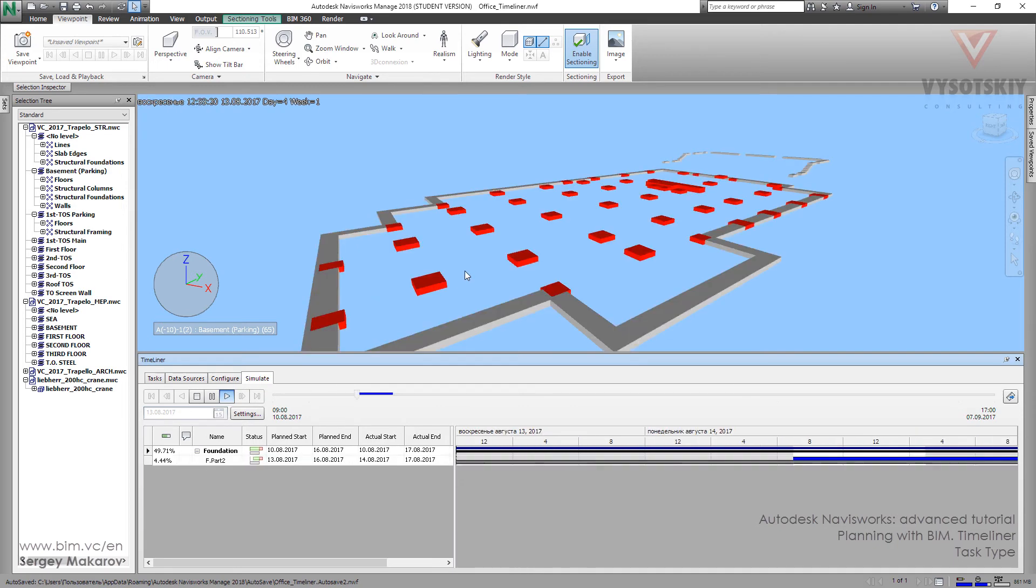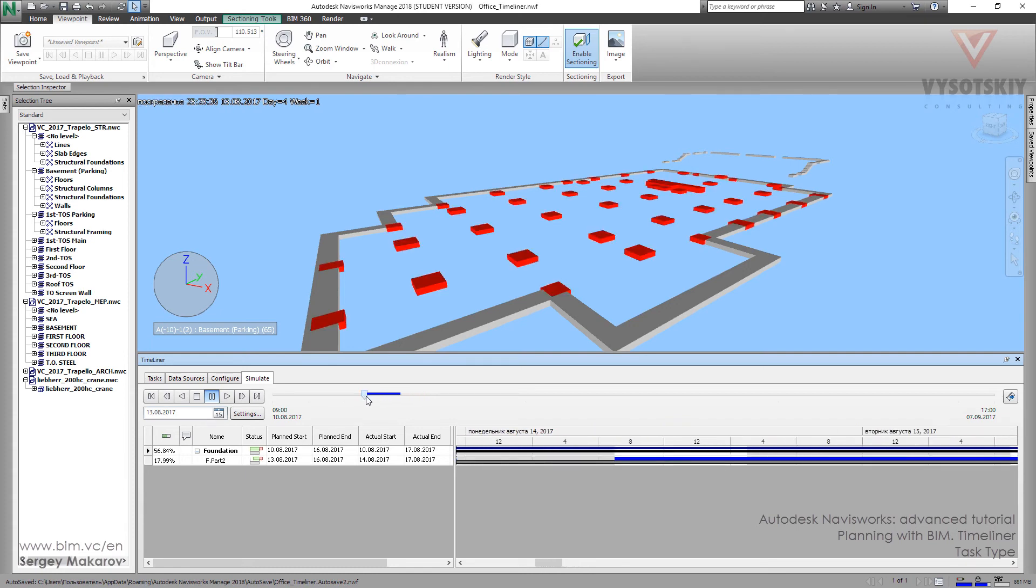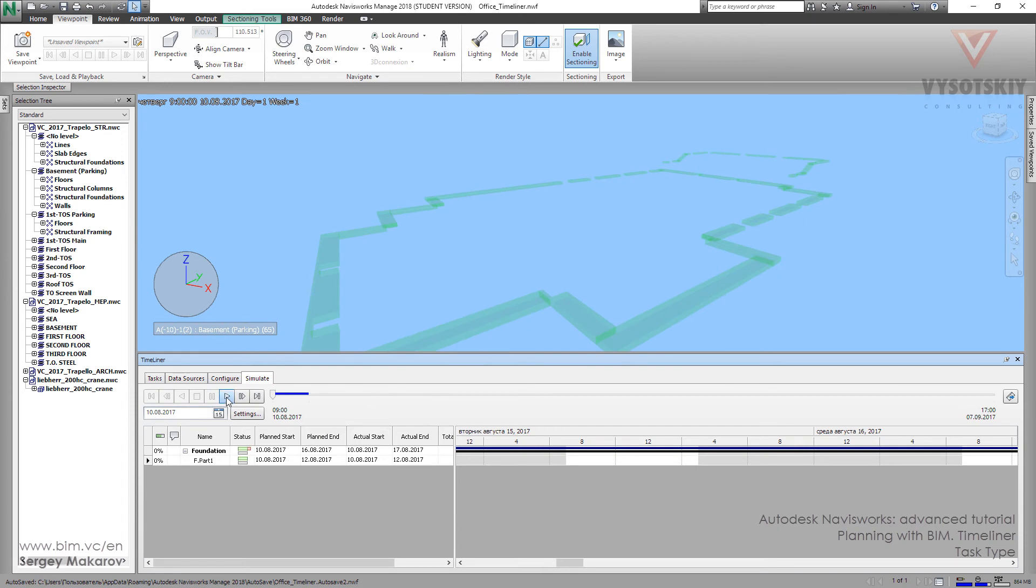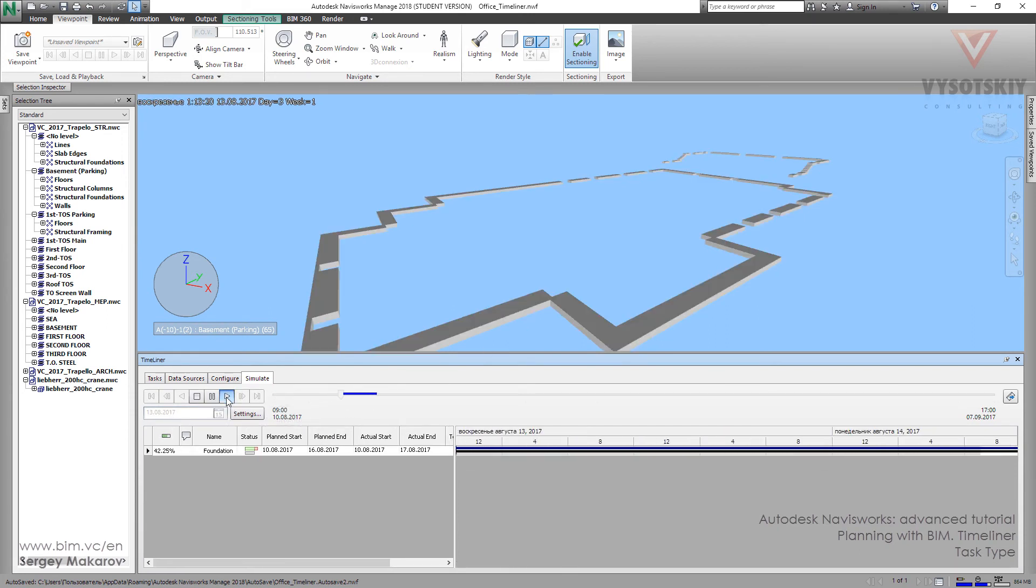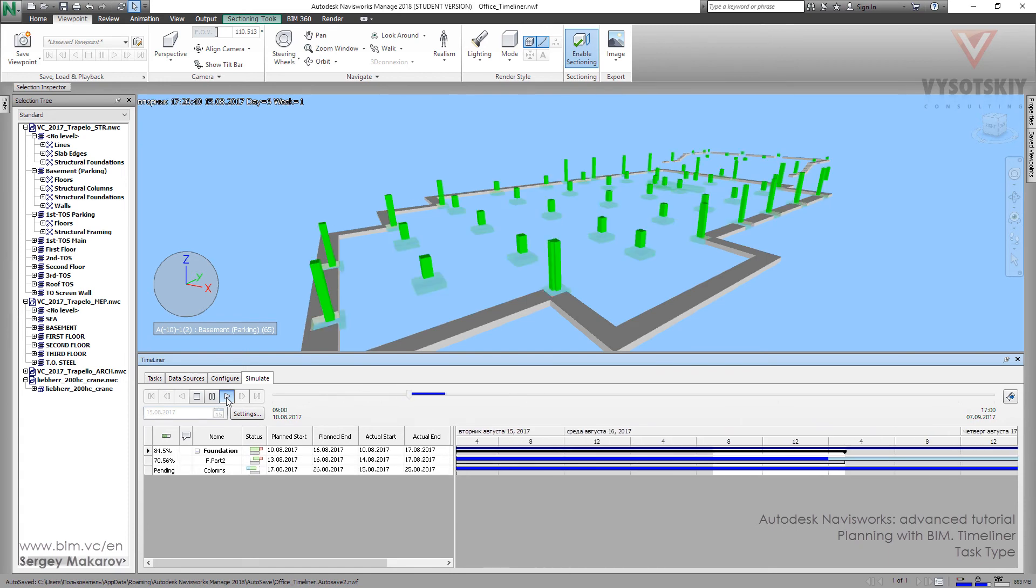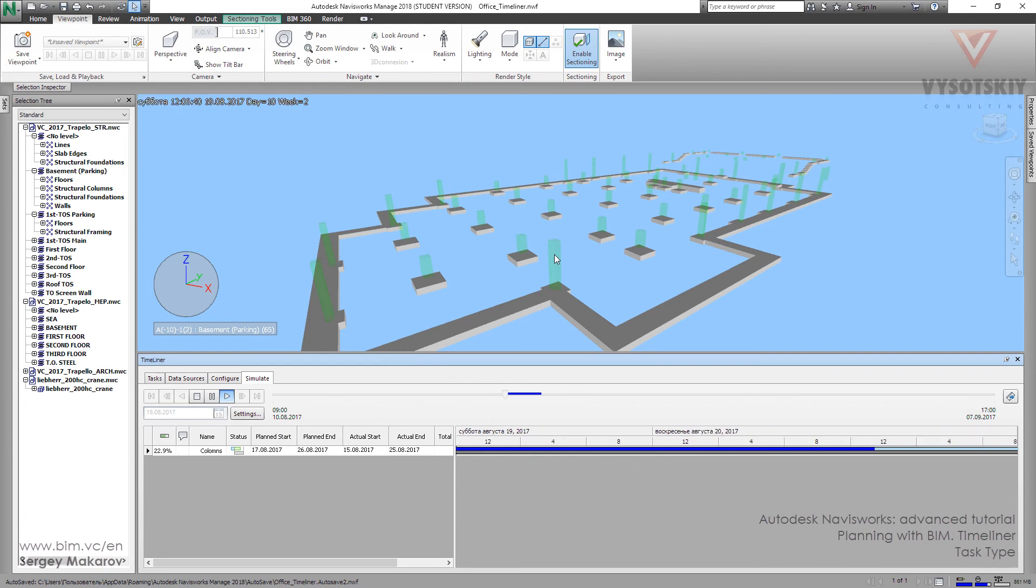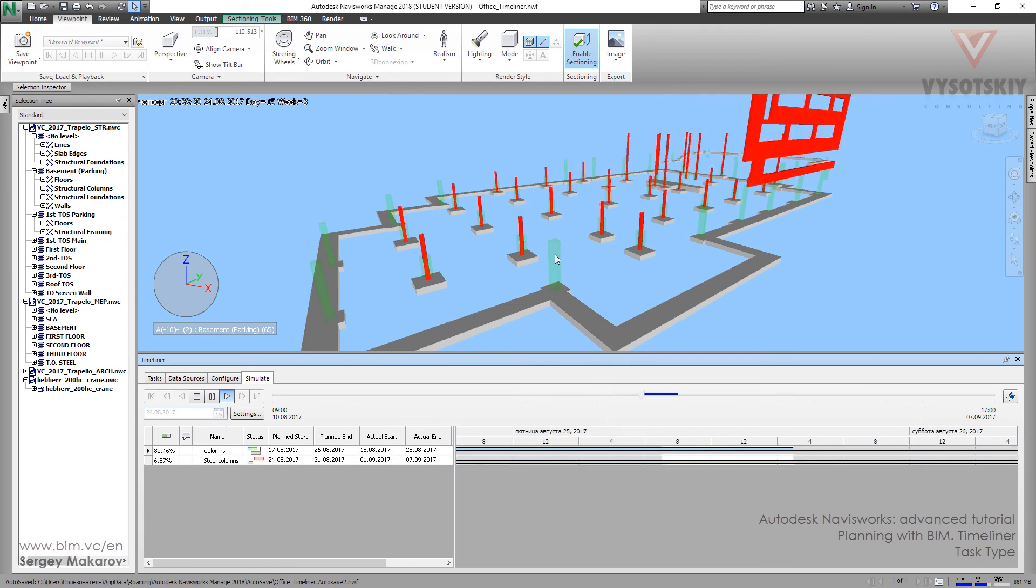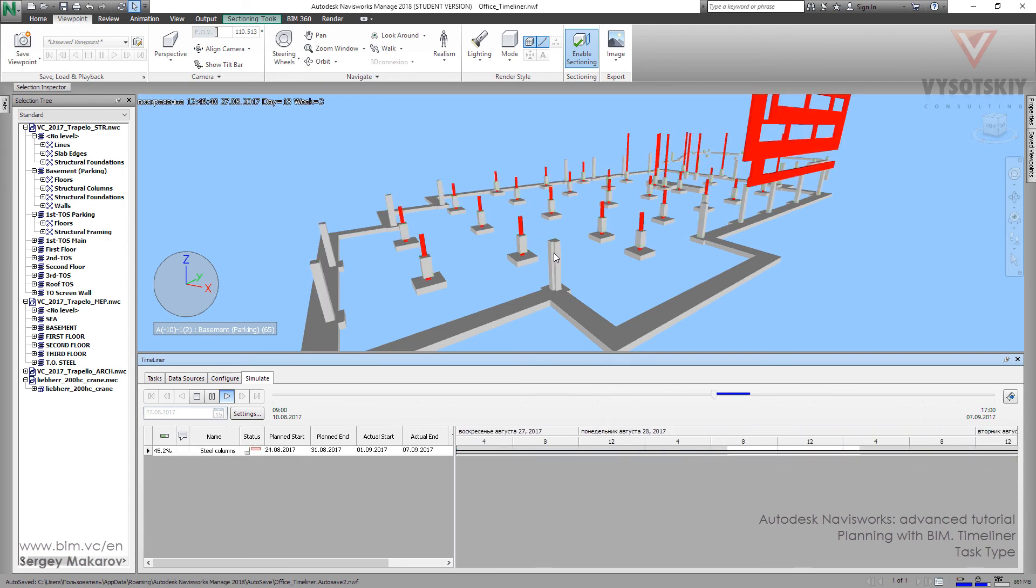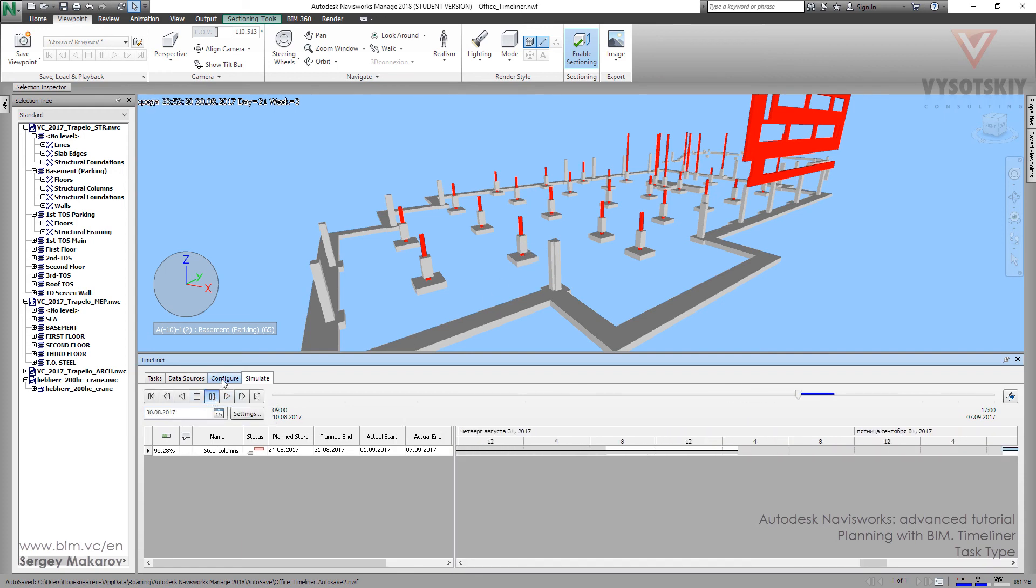As you can see, a couple seconds ago it was red because we said we want red elements if an element is late. That's why here it's red when we try to make a difference between plan and actual. It's yellow now because these elements at the beginning are very fast construction. And now this is red too because it's late, and now it was fast.